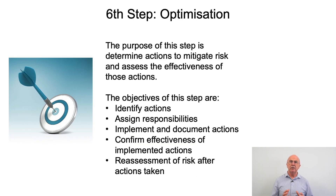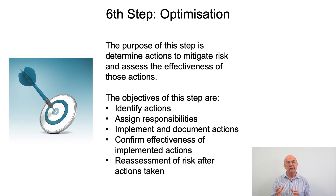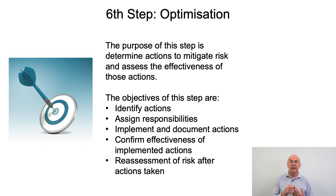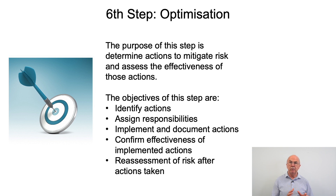Step six: optimization. The purpose of this step is to determine actions to mitigate risk and assess the effectiveness of those actions. In simple terms the objectives are: identify actions, assign responsibilities, implement and document the actions, confirm that the actions have been effectively implemented, and only then go back and reassess the risk after the actions have been taken.